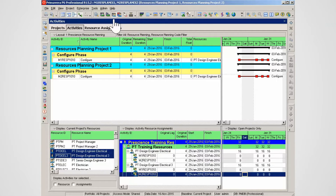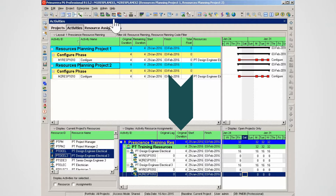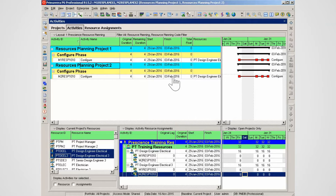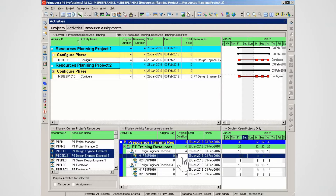Select the resource usage spreadsheet icon from the main toolbar. The resource usage spreadsheet shows original lag and original duration in the center pane. Note the two resources selected — each resource is assigned to the two activities shown in the Gantt chart. This method uses original lag to move the resource allocation in time.